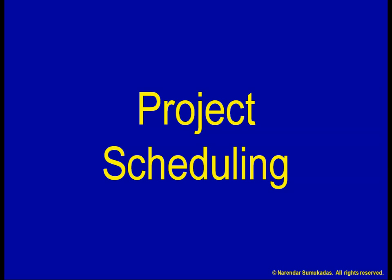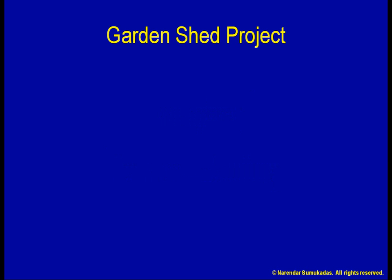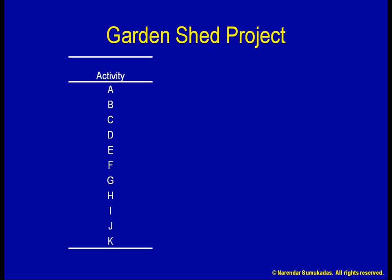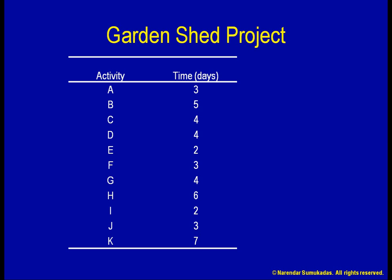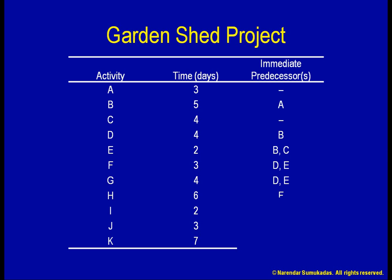Consider the following example. Suppose I am looking to construct a garden shed in my backyard. I identify all the different activities that need to be conducted, then estimate the time required for each. There is a total of 43 days worth of work involved. Further, I express the interdependencies among these activities in terms of each activity's immediate predecessor — that is, the preceding activity that must be completed before each activity can proceed.